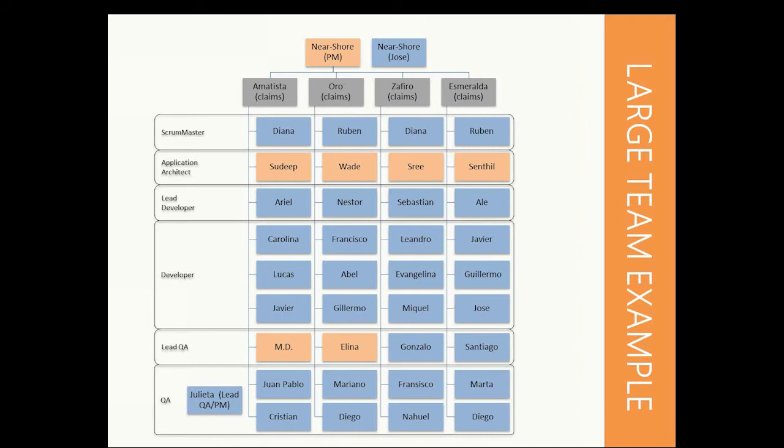It is about keeping this whole group of people that we currently see on the screen, who are together responsible for producing a new claims processing system, to help each other. The Scrum Master can often represent the team and can explain what's happening, where progress is made, and what was finished, and can even phrase a few problems. But if one of your developers has got something to explain, I am totally open to bring that developer or that QA person into the Scrum of Scrums.